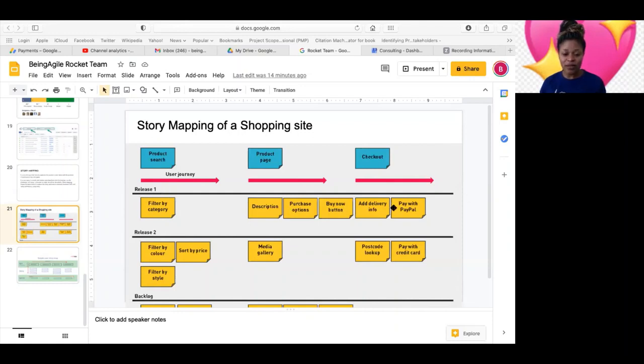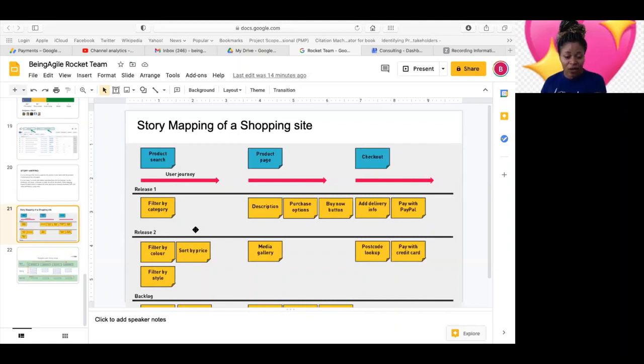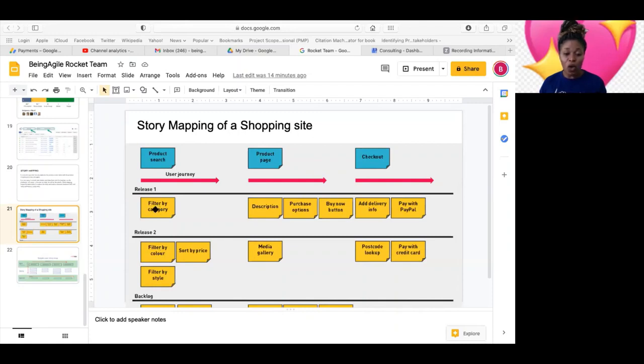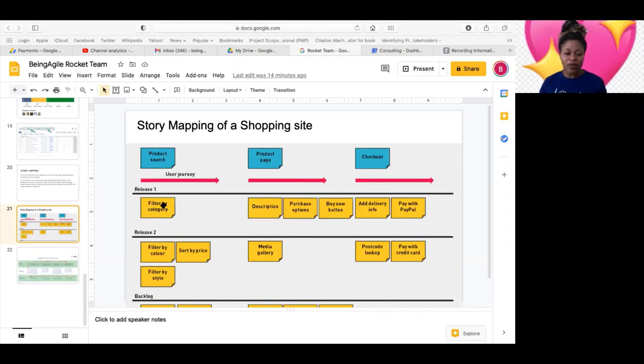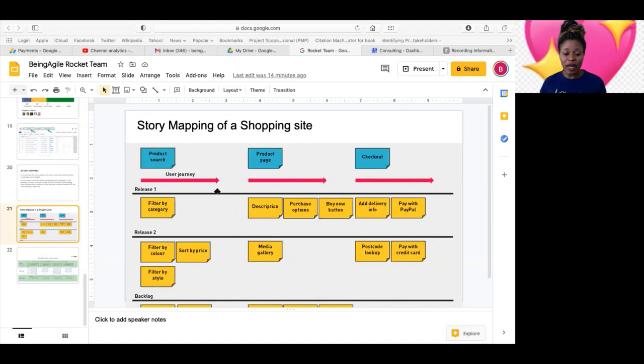Because this is what they plan to release in the first release. They want to release all of these in the first release. So now, just by doing this and sticking all of these, you understand that, okay, you cannot go and be working on user story filter by color when you've not completed user story filter by category. So now you will know how to prioritize. So you will know that, okay, this filter by category should fall in the first sprint.